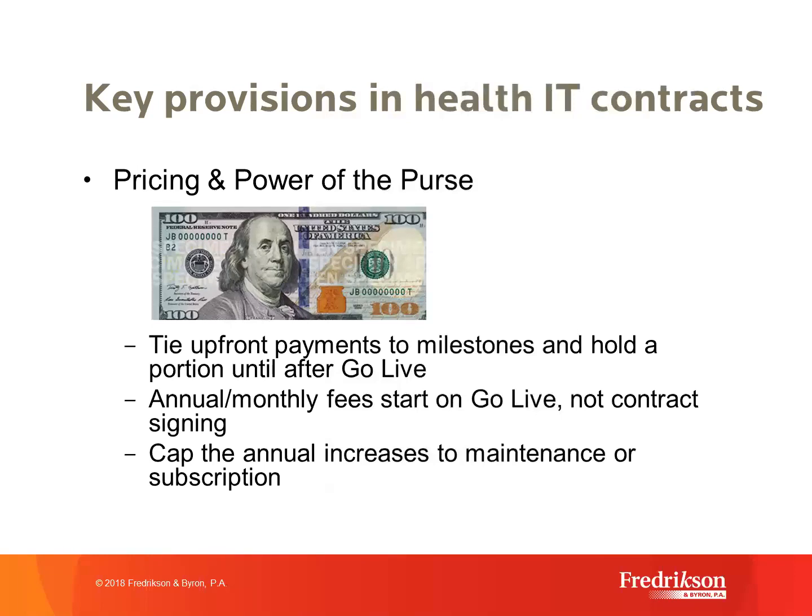My comment to you, and I'll say this in negotiations, is that an 80% finished IT project is worth probably $0. And even a 90% complete project is worth probably about $0. And so what I recommend, I think it's reasonable to say, yes, the vendor will have some immediate labor costs. And so maybe you pay some amount, maybe half, maybe a third up front or pretty shortly after contract signing. But I really want you to save other payments if you can for measurable milestones, and particularly saving a decent amount until go live, successful go live, because your ability to have the vendor move quickly to solve certain problems or issues, if they know they get a big paycheck or payday when that issue is solved,